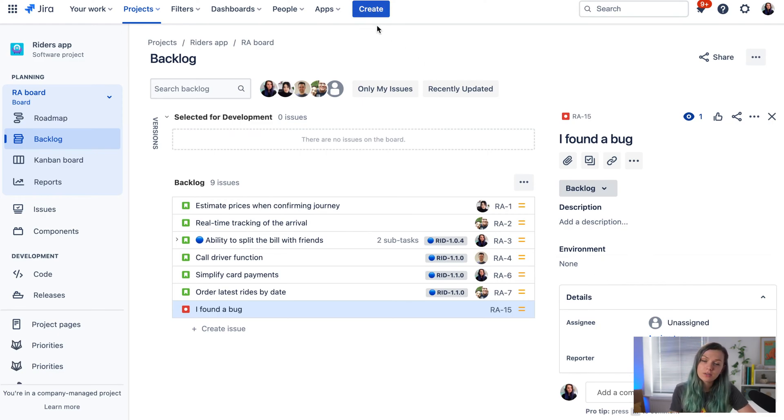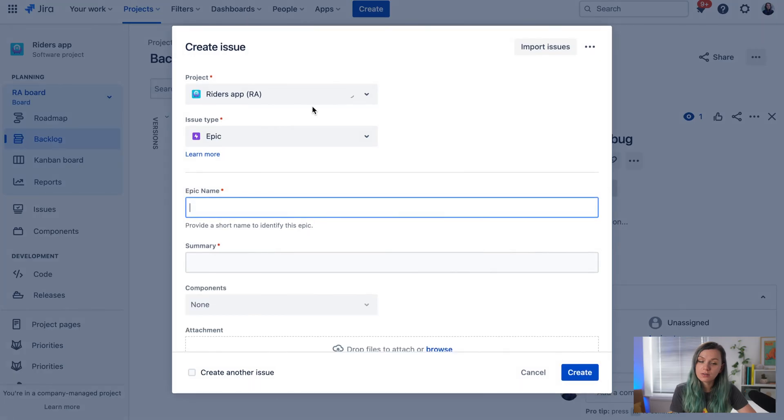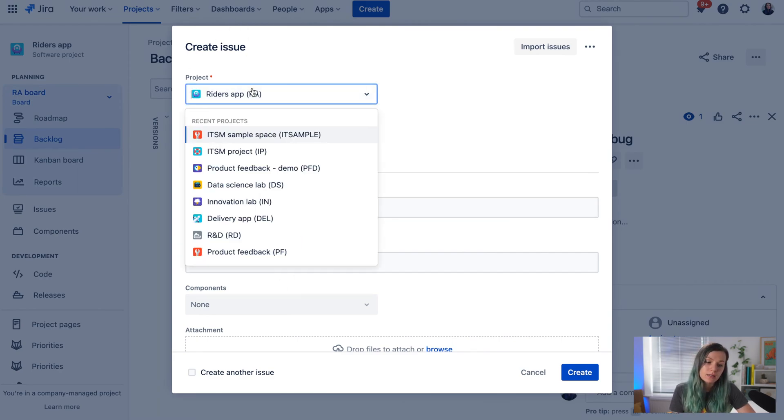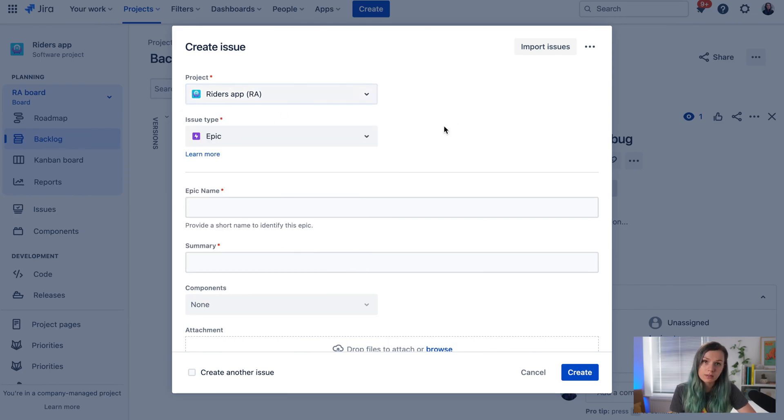Another way to create a JIRA ticket is to click the blue create button. Here you see a project field where you select which project you want to create a ticket in.